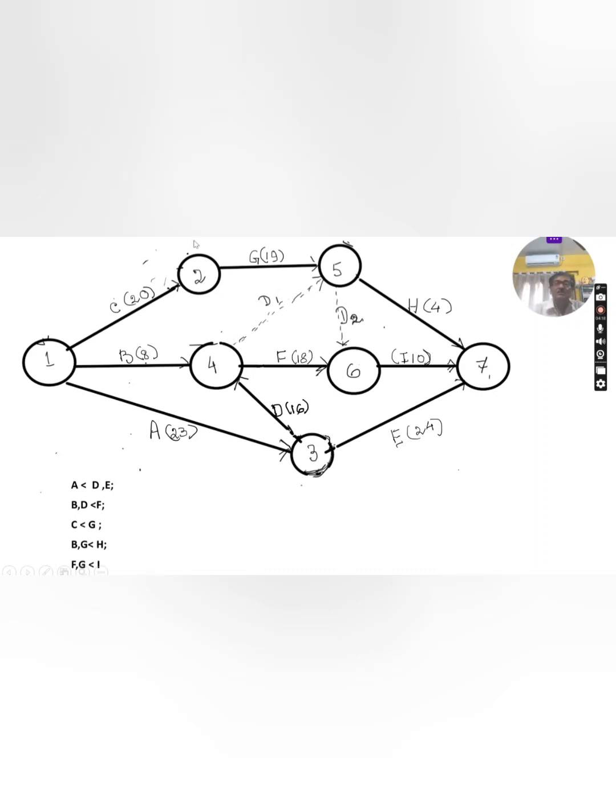So now I am not going to discuss how to draw the network. I am just showing the logics given for the activities. A less than D and E means D and E activities will be done only after completion of A. Only after completion of A, activities D and E can start. They cannot be started before A. C less than G means after completion of C, G will start. Check it. For better understanding, you see the previous video. I am not going to waste the time.